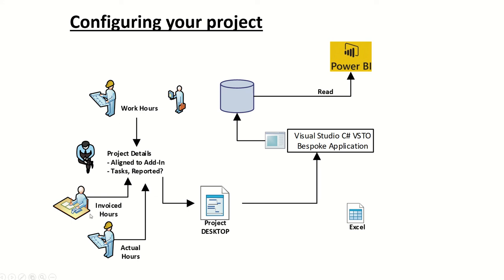And then the invoiced hours. Now, the accountants tend to sum up the invoices. So you might say customer X has got an invoice for 50 man days, as we say, so £50,000 in UK money, GBP. But it's up to the project manager to then apportion those hours to the tasks. So we need some way of supporting that, which we do, right? I've done that, so that's available.